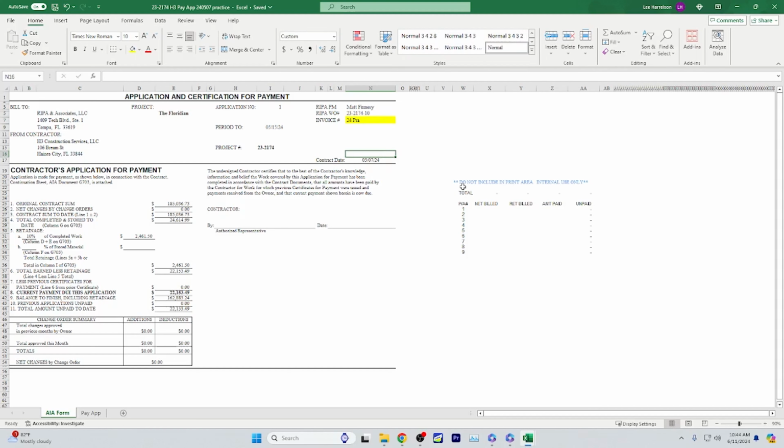Now all you do is save it, and then you will email it to the project manager, Alyssa Lang, and Devin Christian. The project manager will be the one that approves it. Alyssa Lang is our accounts payable person that tracks everything, and then Devin Christian is the expediter. She oversees, and she wants to see them come in, and then they start tracking. The project managers have a certain amount of days to approve it and get it back to them, and she kind of just oversees everything.